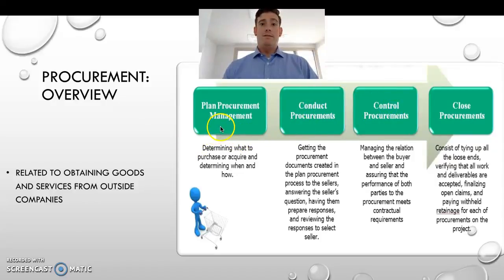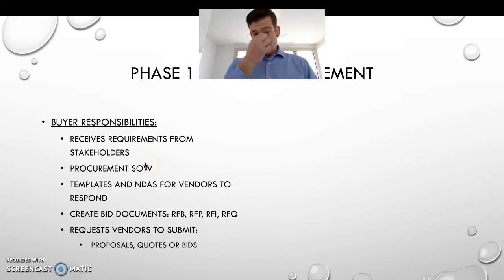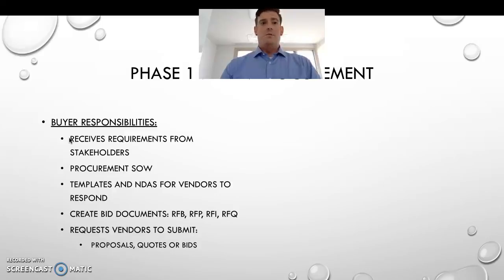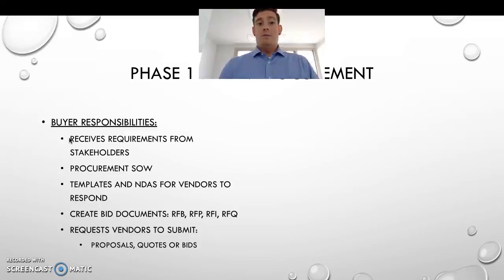Phase one: plan procurement. The buyer is the one with all the responsibilities in this phase. They have to receive requirements from stakeholders to know what they're going to be doing. They need to create a procurement statement of work and prepare templates and NDAs for the vendors to respond to.